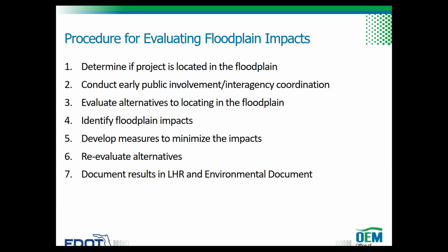Potential floodplain impacts shall be addressed for all FDOT projects which involve activities or constructions near or within floodplains. Each project alternative is analyzed for potential floodplain encroachment, and the results of the impacts, positive, negative, or indirect, are documented in the location hydraulics report and briefly summarized in the environmental document. The procedures for evaluating floodplain impacts involve the following activities.